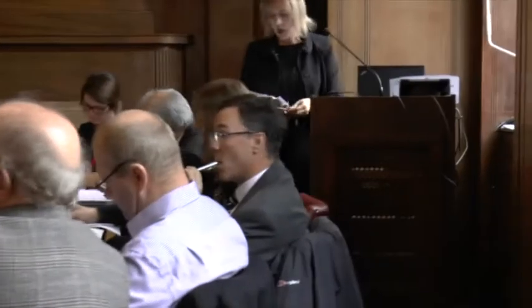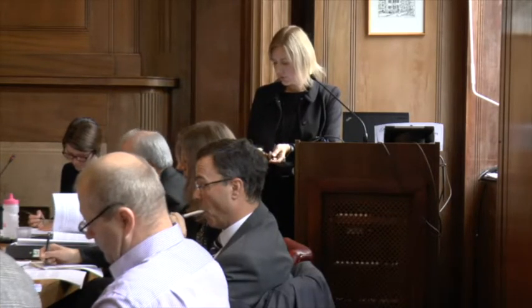Yes. Thank you. So you're looking at condition 13, which is on page 64. Yes. In that second part, B, if you look at the very first paragraph, so prior to the full operation after commissioning, arrangements for aircraft testing outside the GRE shall be submitted to and agreed in writing, and those arrangements shall also include details. B, the details shall be the alternative location or locations. So that will be geographical locations within the airport that will be provided to the planning authority for agreement as part of the planning condition process. It's the details that will be agreed as part of the condition process.